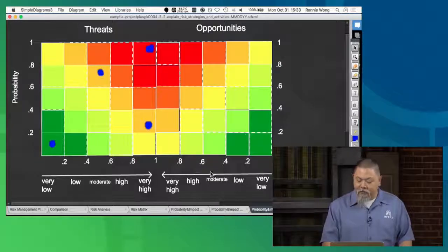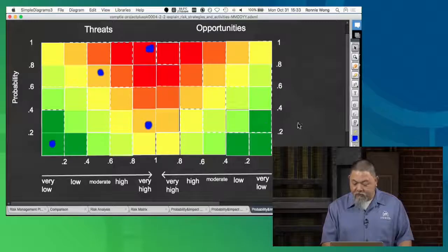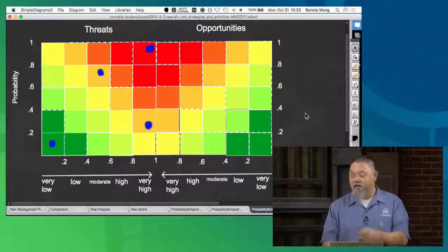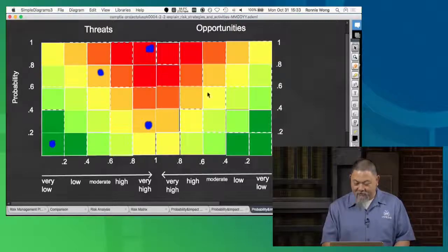So if you do have something like that where you start generating this, let's just do one or two of them over here on the other side, and we'll change this color to black. I guess that's kind of weird, but why not? I'm trying to pick a color I didn't actually have in my matrix here. So A is actually 0.18, and the way that I have that is that the probability is about 0.6, but the impact is about 0.3.